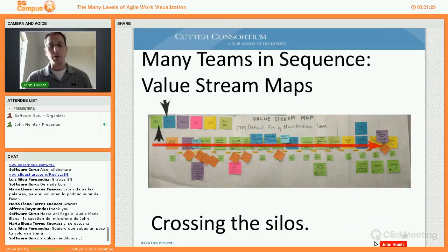One of the things that became particularly obvious in this case was in this setting here. What this was doing was providing an opportunity for the team to test their fixes in an integration environment. And it's not possible to read this sticky note. It's too small and also reflects information private to this organization. But the consequence of what was on that sticky note was that the amount of time it took to deploy new code to the integration environment actually was a significant portion of time that was delaying getting these fixes to customers.